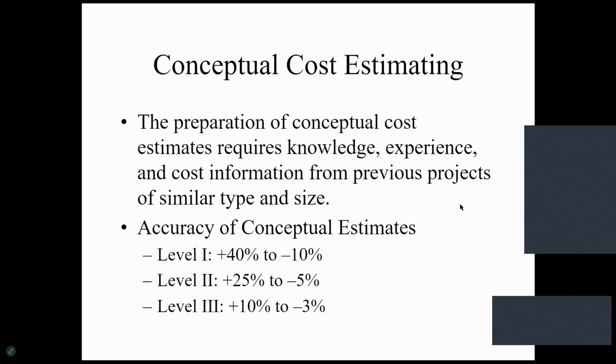The preparation of conceptual cost estimates requires knowledge, experience, and cost information from a previous similar project, of similar type and similar size. The similar project is your company data. You may do projects with similar design in different cities, in the same city, or in the past, and you use those previous data to estimate what your new project cost looks like.